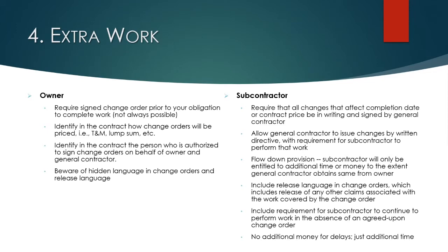And when it comes to delays and those types of claims, you want to scrutinize that change order to make sure that the only thing the subcontractor is getting vis-a-vis a change order for delays is additional time.